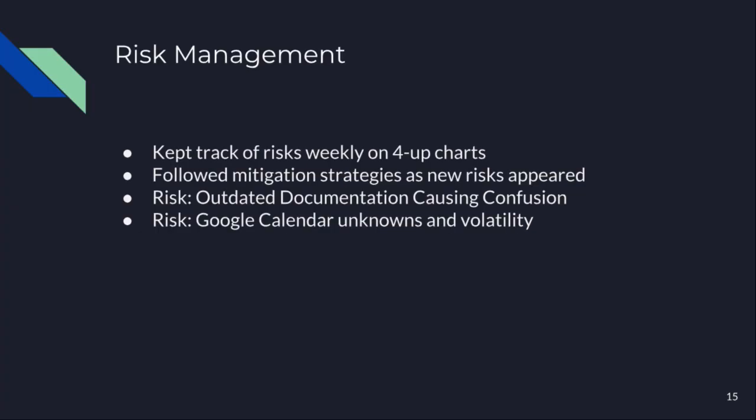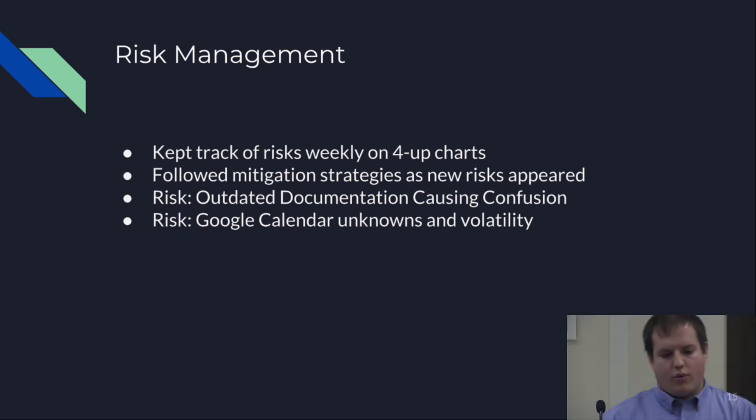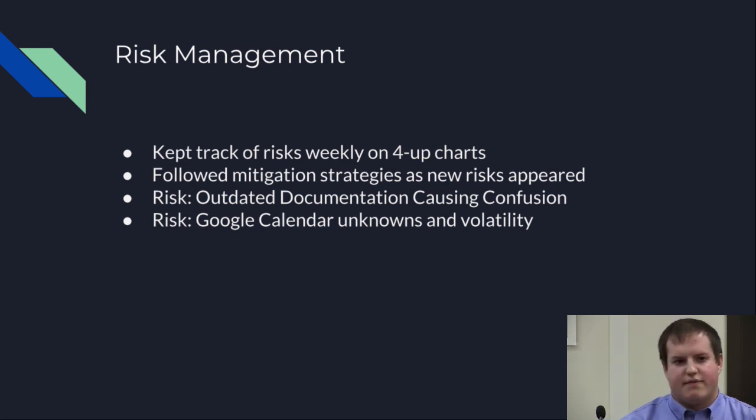Looking at our risk management, on a weekly basis, we would include any risks that we are currently facing within our 4UP charts that we would then present at our weekly sponsor meetings. This way, we were able to provide transparency and concerns that we had regarding the project and moving forward. We also created risk mitigation strategies for each of these risks as they were active risks that we felt had a fairly high probability of encountering. With that in mind, we wanted to mitigate the impact of these risks where we could.